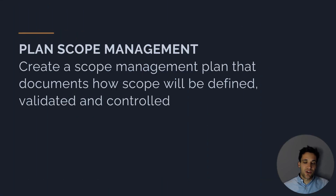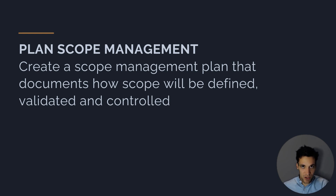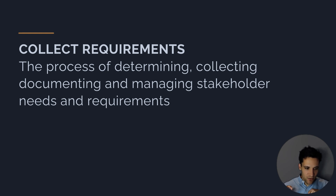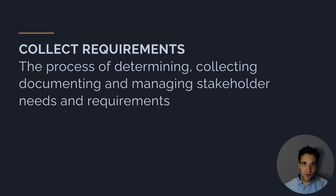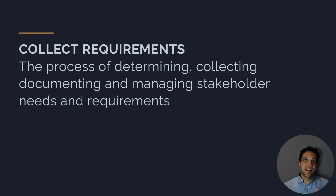The next concept is planning scope management. Remember in section two we're going to go through all of these in much more detail, but planning scope management is creating a scope management plan that documents how scope will be defined, validated, and controlled. All our management plans are the 'how' of the project — we're not defining project scope in the scope management plan, we're talking about the process through which we'll manage it. The next concept is collecting requirements — determining, collecting, documenting, and managing stakeholder needs and requirements. There are all these organizations that are project influencers with certain needs they want the project to fulfill, so we go through a formal process to understand them and integrate them into our project scope.